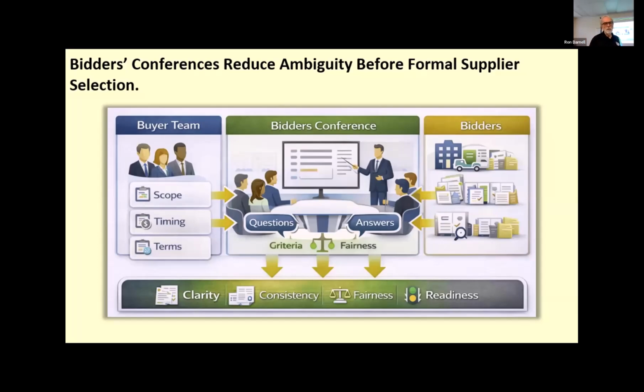In the new view, how I see this working, I got involved with this a little bit at Texas Instruments, where we had sourcing. We had all these international contracts. So we had contracts with Chinese companies and Japanese companies, Indian, all over the world. France, they had their own vendor department. And what we would do is they would have these bidders conferences, but they would have the project manager and the key team members all come and participate in these bidders conferences. So, you had to know how they're going to work, and you need to know what's going on.